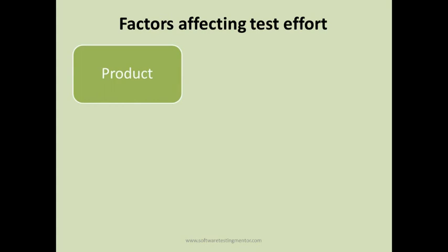So what are the factors that affect the test effort? The first factor is the product. For example, if you do not have sufficient product documentation, you will require more time for understanding the product and doing the testing. So that's one factor that affects the test effort. You will require more effort if you have less documentation or bad documentation. And then there is the complexity of the project. If the project is more complex, the test effort will be more. If the project size is big or huge, then the test effort for that project will be more.